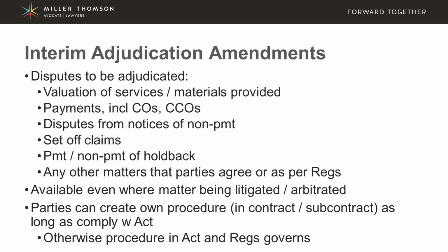Now, it's important to bear in mind that this adjudication process is still available even if a dispute is going through litigation or going to arbitration. So it's almost like you have a doubling up of the processes to resolve disputes. So that is something to bear in mind, because if you have a dispute from a notice of non-payment, it has to go to adjudication, but you still could litigate it in the courts or take it to an arbitrator.